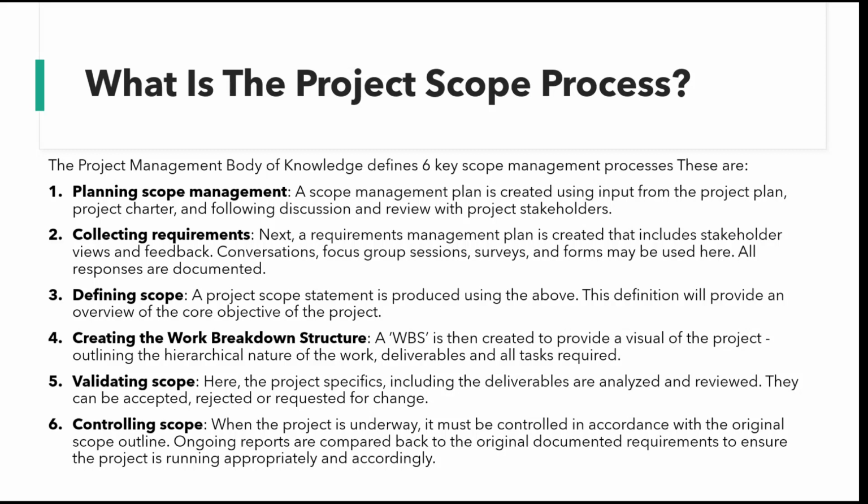There will be some requirements that need to be collected from the different stakeholders. And that's put into a requirements management plan, and that includes the views and feedback from the stakeholders, and it can come in the form of conversations, focus group sessions, surveys, or the submission of different forms. And all of these responses will be documented to refer to.